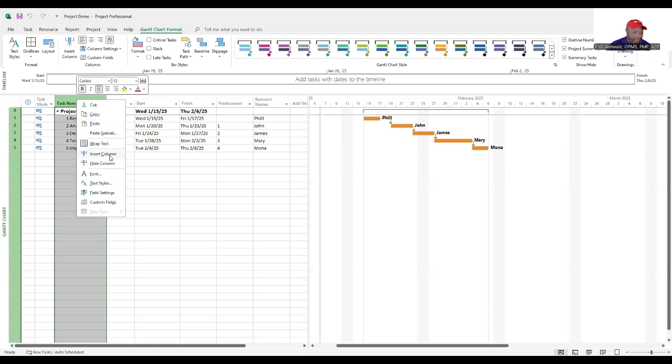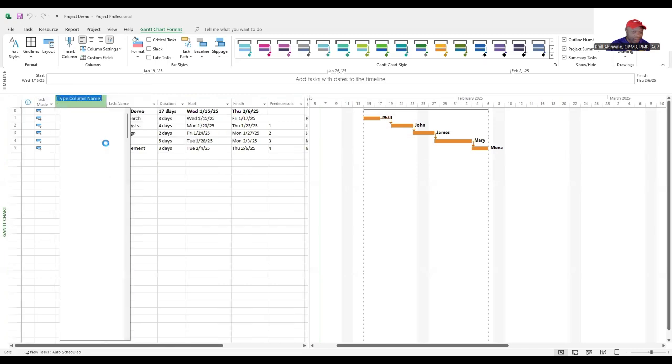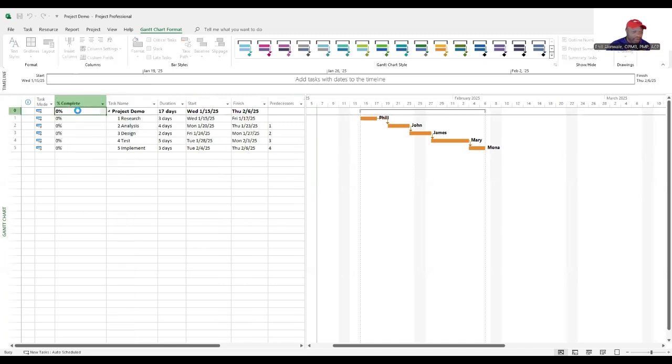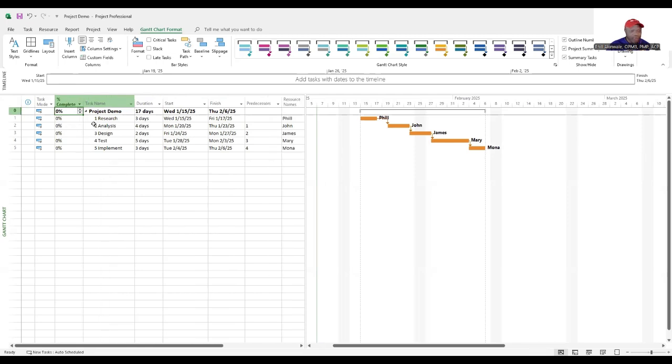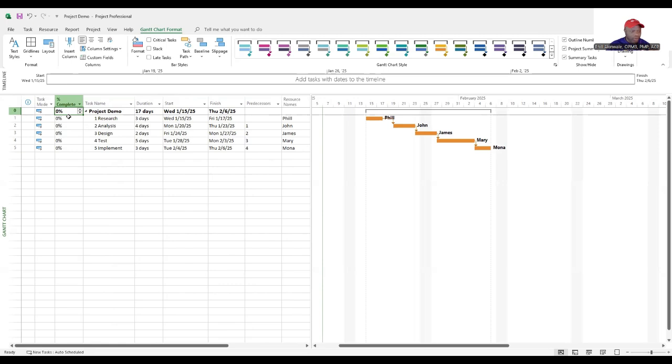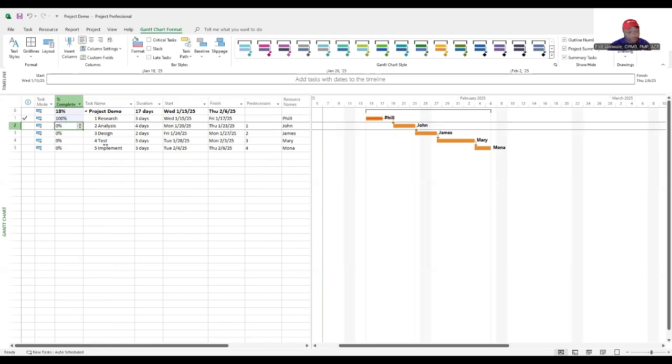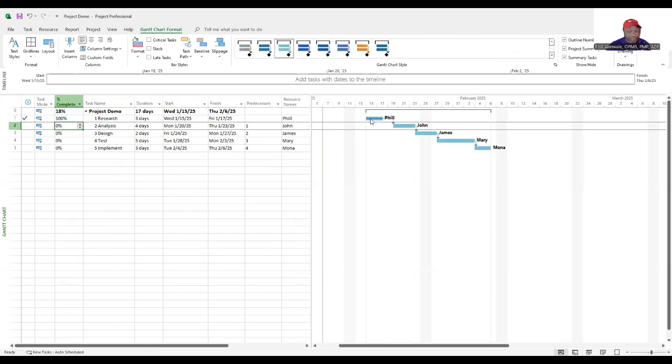Right click and insert a column and this column we will call it percent complete. As you proceed through your project and as the work gets done, you can close out each task by typing in a hundred percent when it is truly complete. You'll be able to see a progress bar there in the middle and that just shows progress for you as the project manager tracking the team's progress.